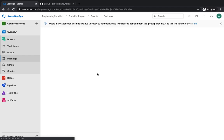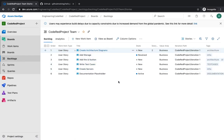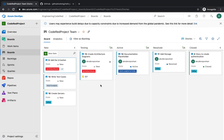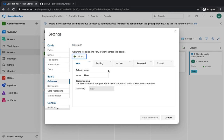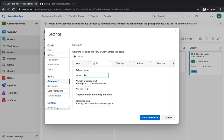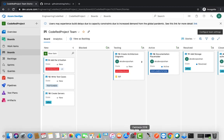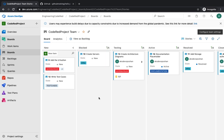That's how your board looks. The board helps you identify what's happening inside each story. You can't just drag a story forever — you need to move it through certain stages, like active, testing, or blocked. You can add a 'blocked' column as well, so if someone is blocked on a story due to some external reason, they can move it to the blocked state and let the team know they're available to pick up other stories.